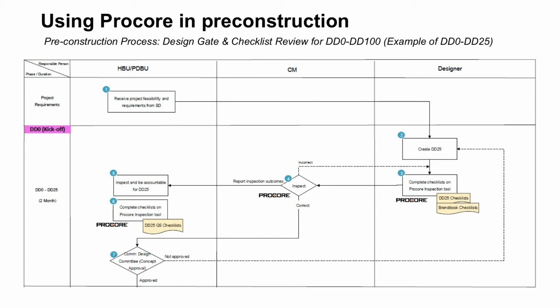We plan to build checklists and map them to the actual documents to ensure that all important information is not missing or incomplete. Timing of each task completion is vital since we need to work with government agencies. So if we miss those time slots, it can cause us a lot of delay and expense. With Procore, the team can plan, review, and collaborate to make sure that everything is in place and accurate, so the permit won't be delayed. After we onboard this critical checkpoint to Procore, we expect to see a much lower rejection of the permit and get it approved with much less effort.